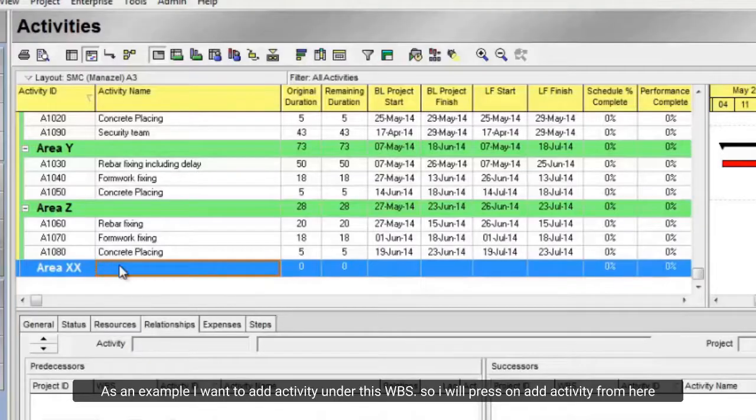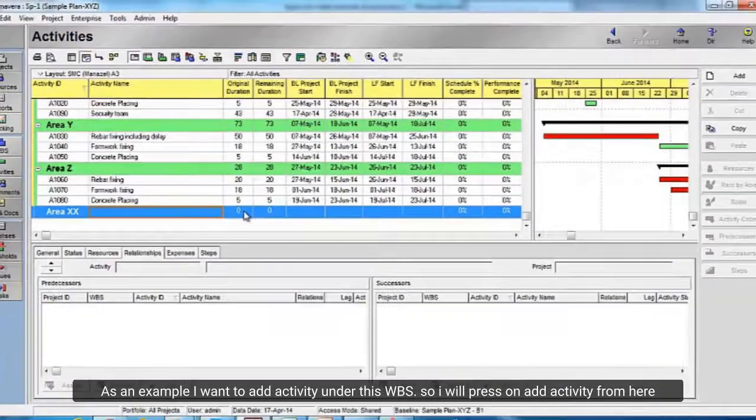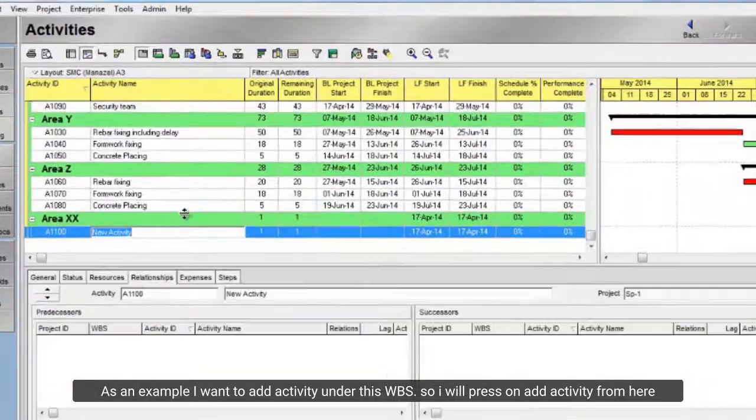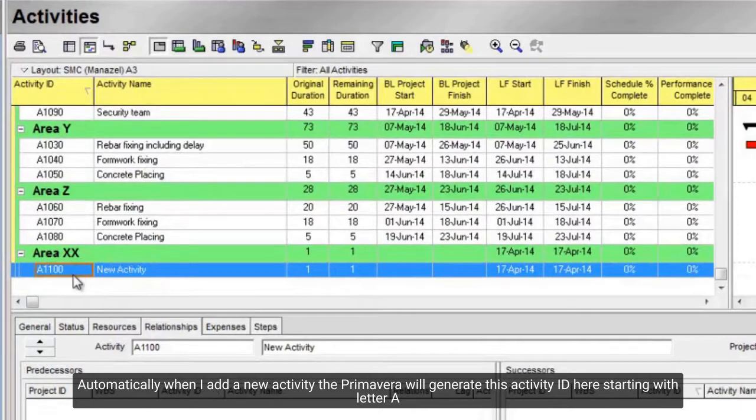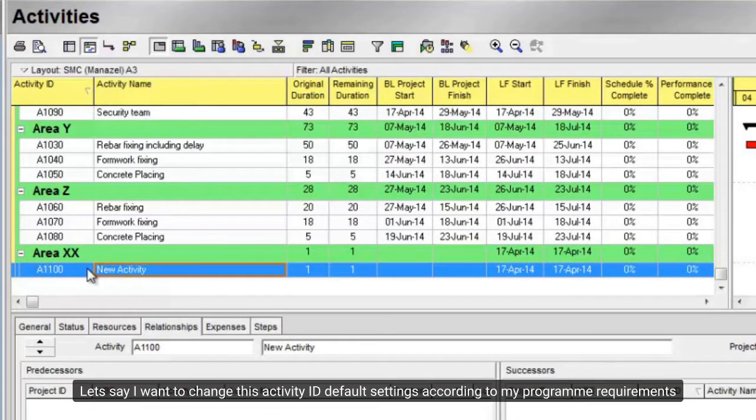As an example, I want to add activity under this WBS. So, I will press on add activity from here. Automatically when I add a new activity the Primavera will generate this activity ID here starting with letter A. Let's say I want to change this activity ID default settings according to my program requirements.